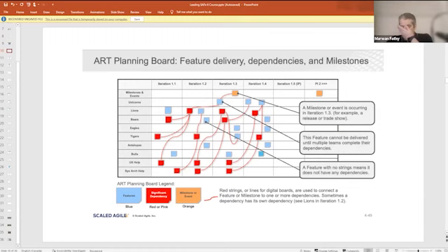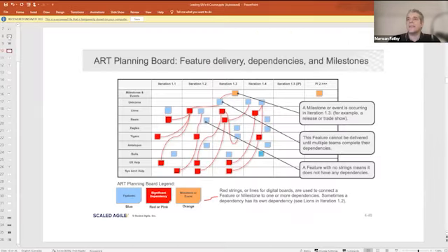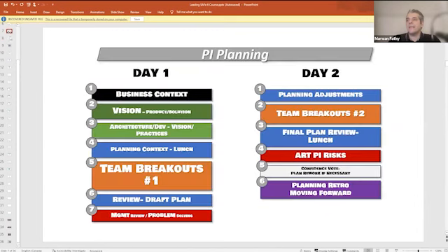You won't, if you have a well-groomed RTE and Scrum Masters. They are the ones responsible to make this event as smooth as possible. How can they do this? They usually focus on certain areas. The most chaotic part of this event, Kala, is this part. The product management would announce, these are the features we'll be working on, the top 10 features. Hey guys, team A, you would be responsible for delivering features 1 and 2. Team B would be responsible for 3 and 4, and so on. Please look at this, decompose it, and give us your estimate of when you will be able to deliver it.